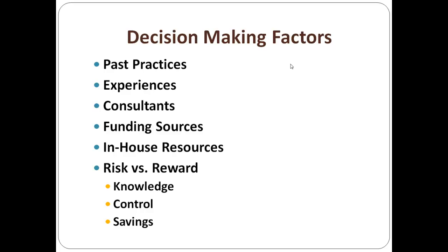The more risk you take as to the cost of the project and assuming the cost of the project, the more control you'll have, the more knowledge you have, and the more savings you should get. The less risk you're willing to take, then the less knowledge you're going to have, control of the quality and the equipment and materials and so forth that are put into the building, control of the design, and of course, you may get none of the savings that are generated, because the people who took the risk for the cost of the project are going to want to earn and keep the savings.